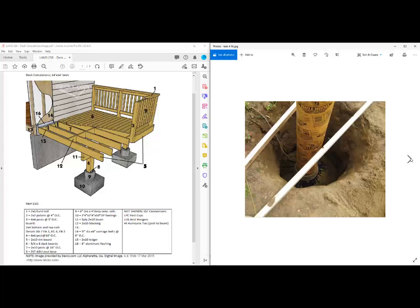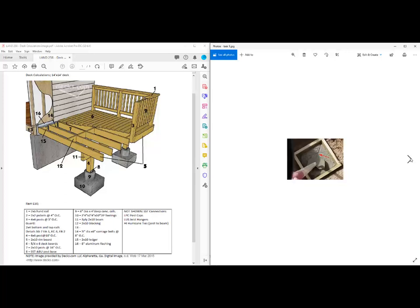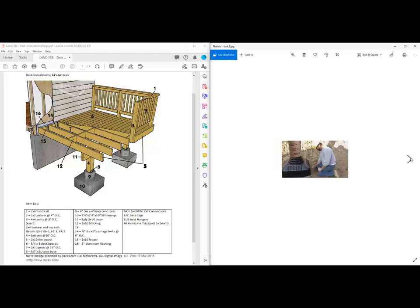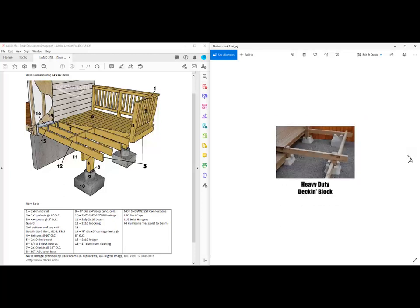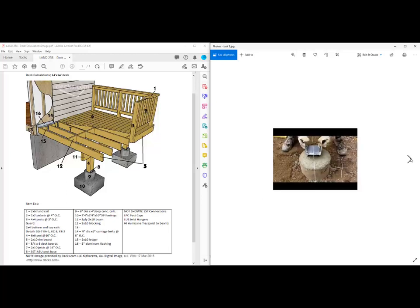Depending on the technique you use determines the task number and the operation. We're going to dig the hole, put in the footing formwork, pour the footing - that's task number six. Install the sonotube, make sure it's nice and level - that's task number seven. Then pour the concrete post in the sonotubes. Here's an example where it's done all at once, which is more expensive. What we cannot do is use deck blocks. In Canada, this is illegal. You can't place your deck just on top of the ground. Frost will get underneath it, heave it, do all sorts of things to it.